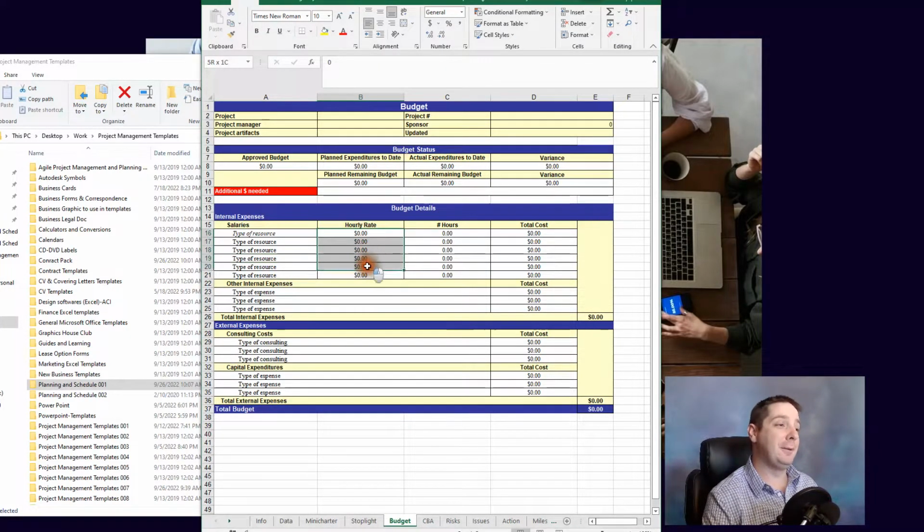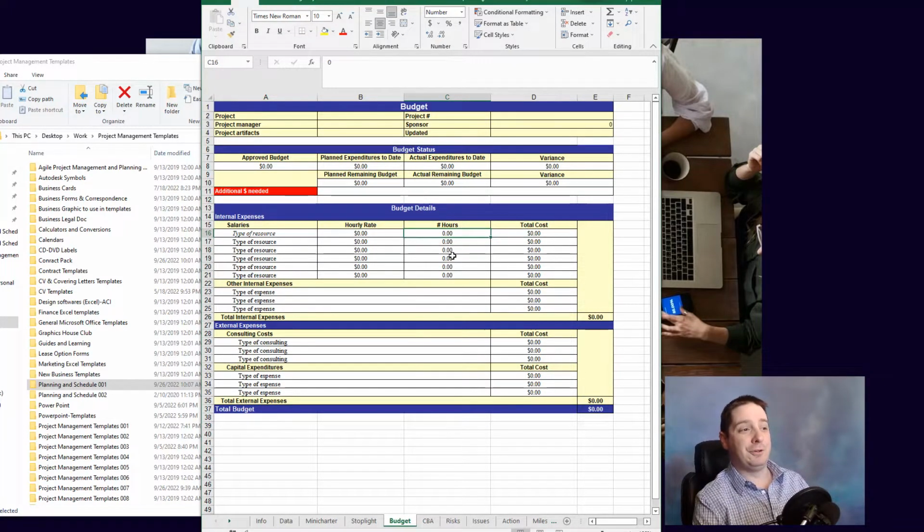Human resources will have the information for you if your manager doesn't have it. That's very important for you because you're going to take that and multiply it by how many hours it's going to take. Generally, you should get a rough estimation of hours from your initial meeting with everybody. Say, hey, what's it going to take for you to design a mechanical fixture for such and such? And the person's going to give you a high ball, 40 hours.